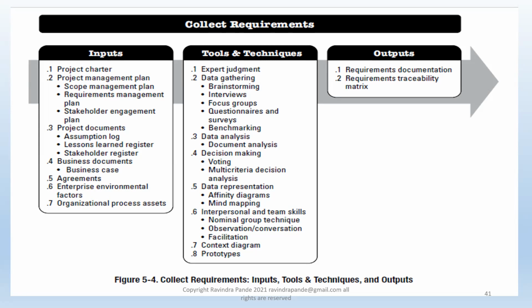Stakeholder engagement plan is a stakeholder register, where I normally mention all these stakeholders, specifically the clients, where I will mention what is the best time to talk, what is the best tool to talk, and what are the requirements he or she having the authority to sanction as well. Because that makes me proactively work with these guys if they have any confusion, contradiction in terms of understanding those requirements or any addition to those requirements.